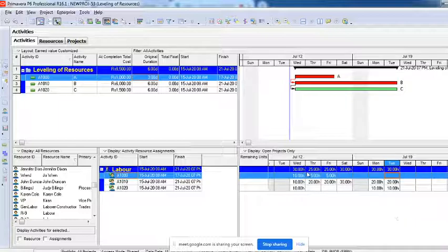Still it is 30, 30, 30. In fact, here I have to make it 10, because I'm increasing it here. You can see here I'm splitting it. First 3 days I'll finish A, but I have taken a gap here, and I'll continue it here. This gap is what is called splitting the activity C. So I'm splitting it by 3 days, and then I'm still finishing on time.